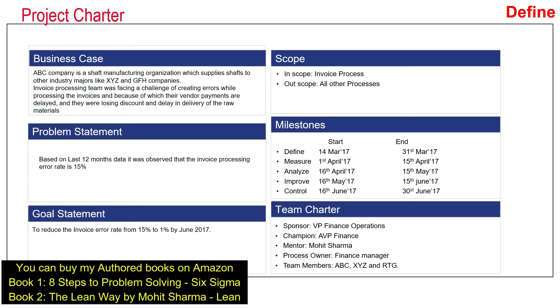This is a SMART goal statement. It contains from and to statements like from 15% to 1%. It is tangible in nature, measurable, and time bound as well. By June 2017, the team had to finish this project. Scope of the project is the invoice process; all other processes of the accounts payable team were out of scope. Team started in March 2017 and had to finish by June 2017. In the team charter, the sponsor is VP Finance Operations, champion is AVP Finance, mentor is Mohit Sharma, process owner is Finance Manager, and then they had team members.